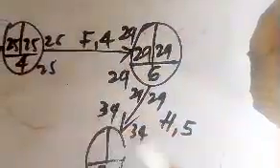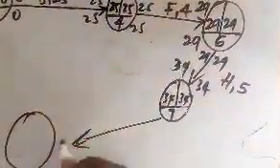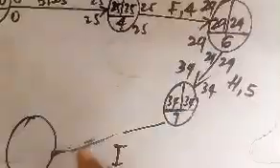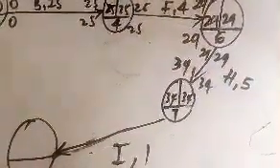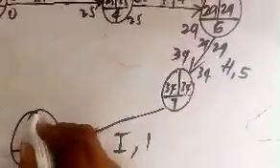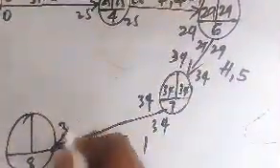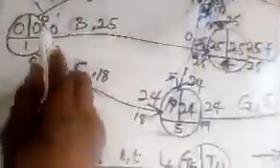So completing my 34, I have it here as my I, with a duration of 1. And I have my number 8, and I have my 35. How? 34 comes out, and I have my 35. You don't need to cram this. Why? It's in the diagram. I'm just drawing this.